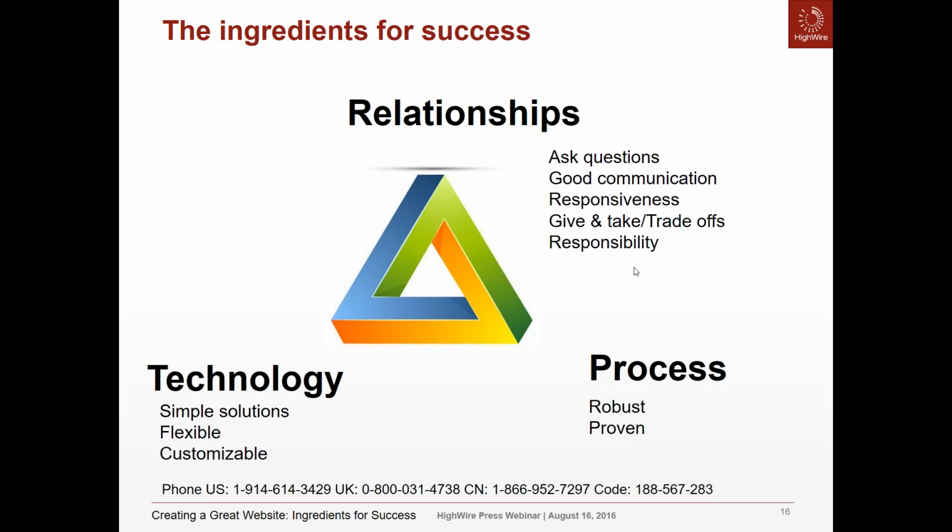Good one. Yes. Who should take that? Well, I can tell you how we'll bounce off each other, but we do have sample content. So Raquel, early on, we built that into the schedule. So they did have some sample content that they gave us that would mimic exactly how their live content was going to come in. So we were able to work up the site with content, although it wasn't live content, so that we had everything in place. So when they did have actual live content, it was going to flow in and they would already know how it looked and be able to make sure that was refined prior. So I don't know if Raquel, if you want to add to that.